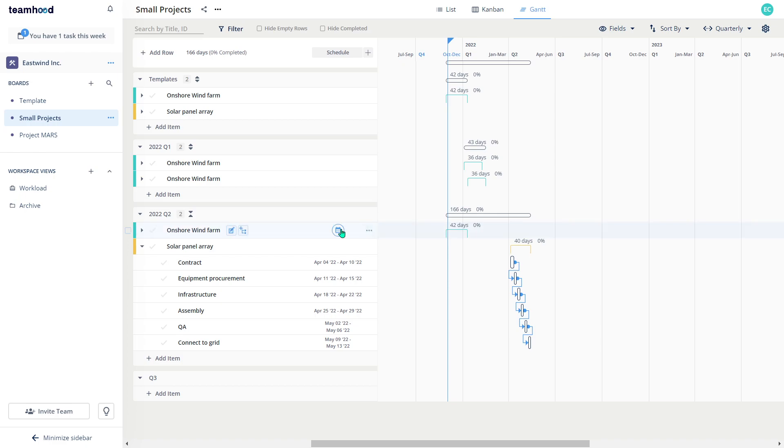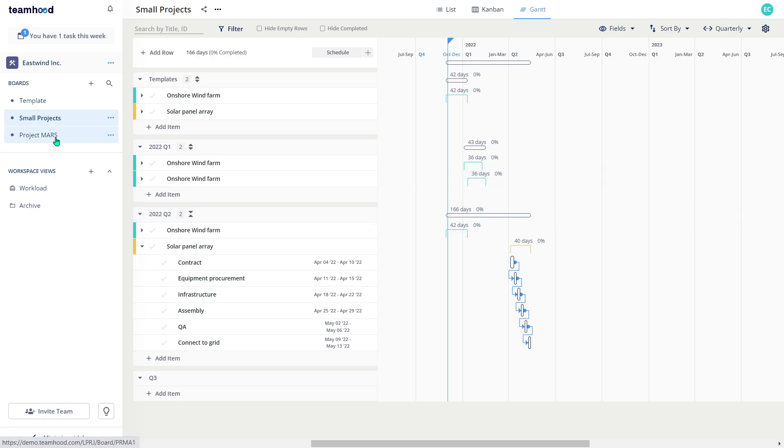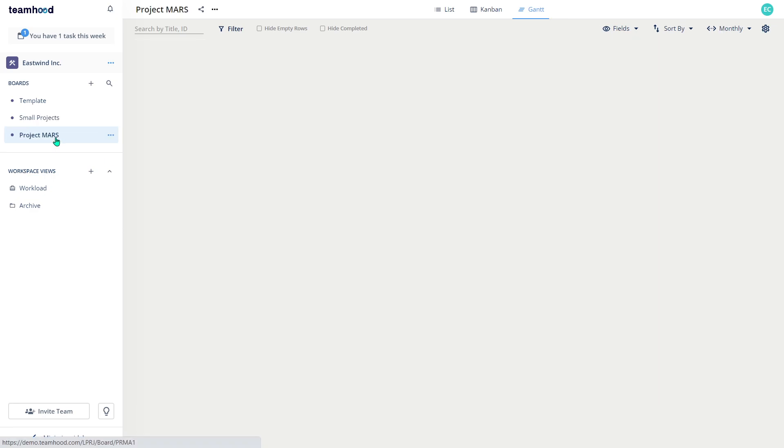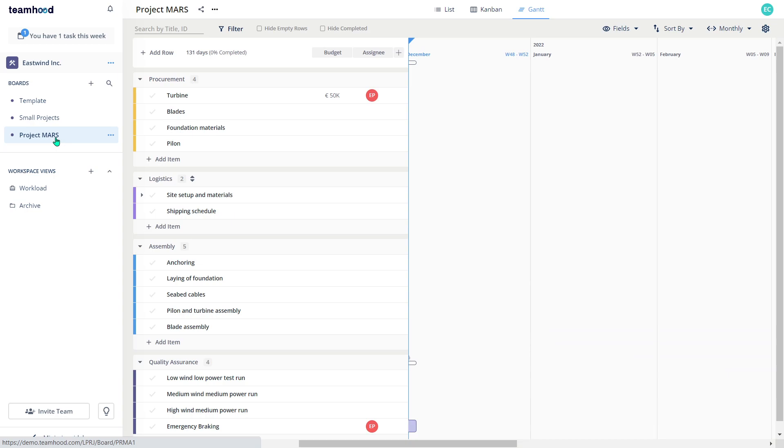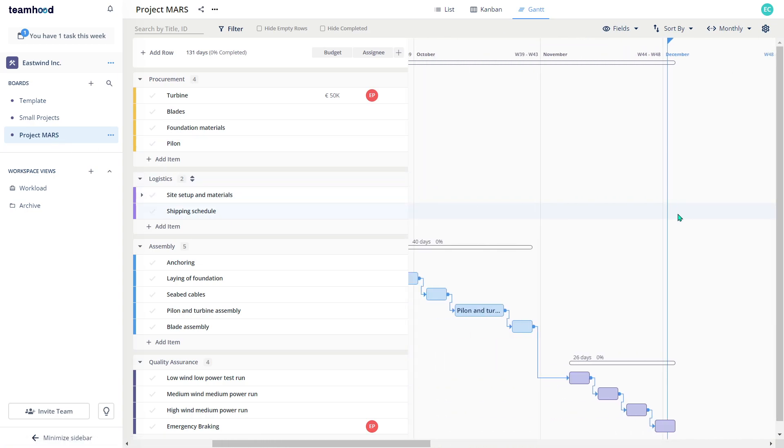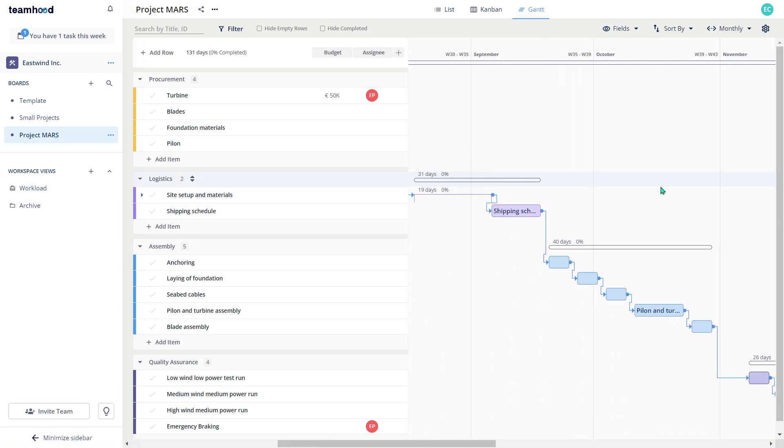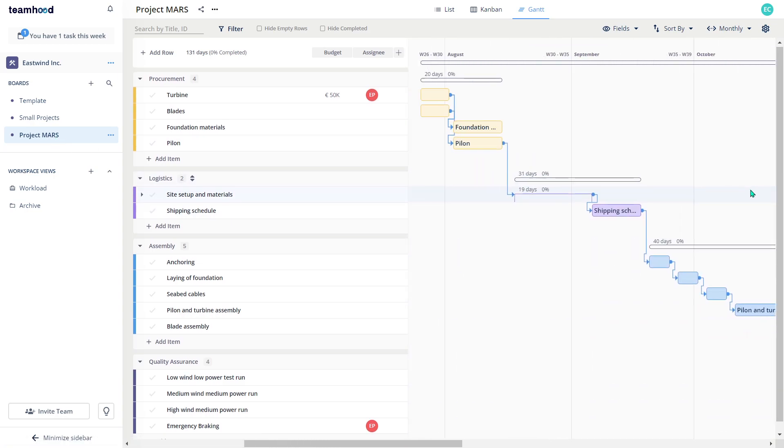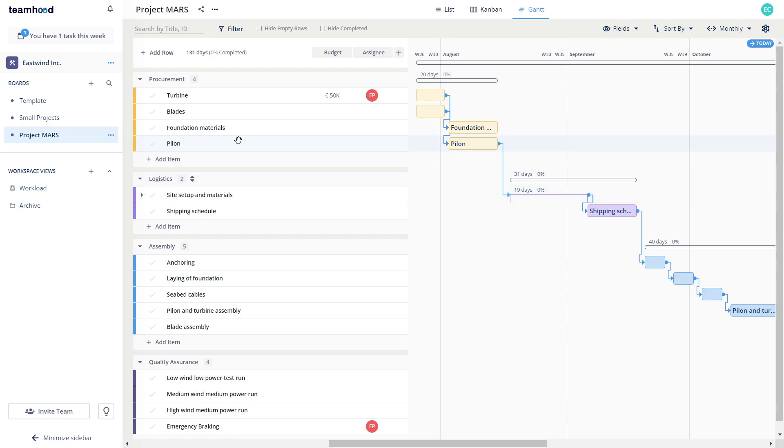And what I need to do is just schedule it, set the start date, and all my work related to that project will be planned for me. So this is a good structure for smaller projects. Now, if I'm working on bigger ones, the regular size projects, I still use boards just as I've showed you before. And cloning boards is the easiest way to reuse project data, so you don't need to create it every time from scratch.